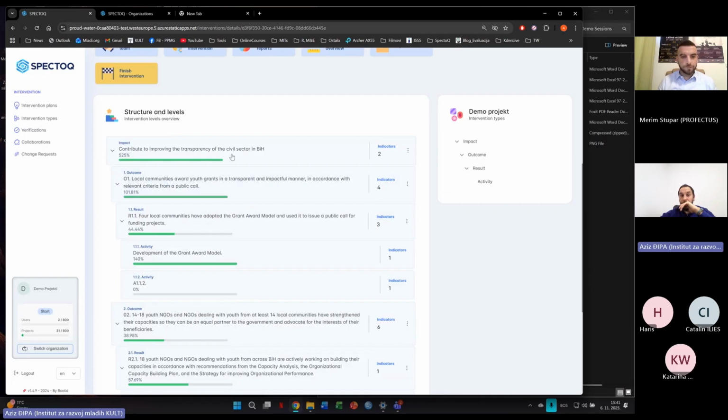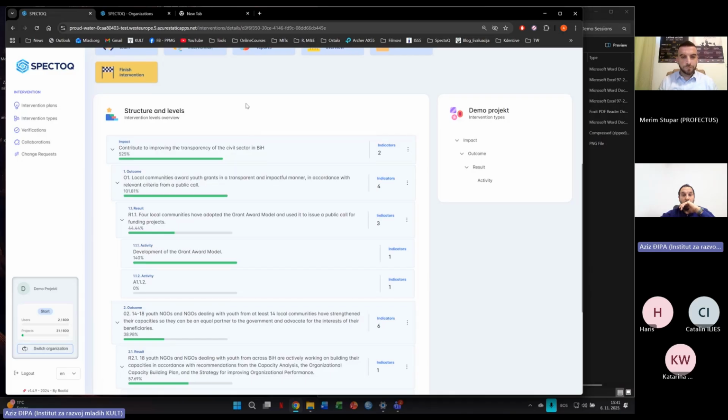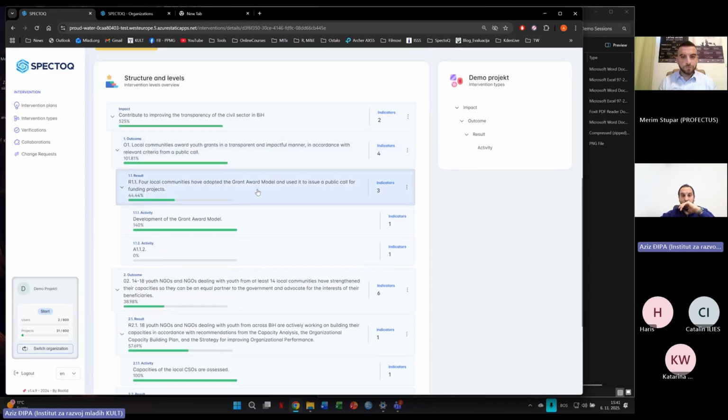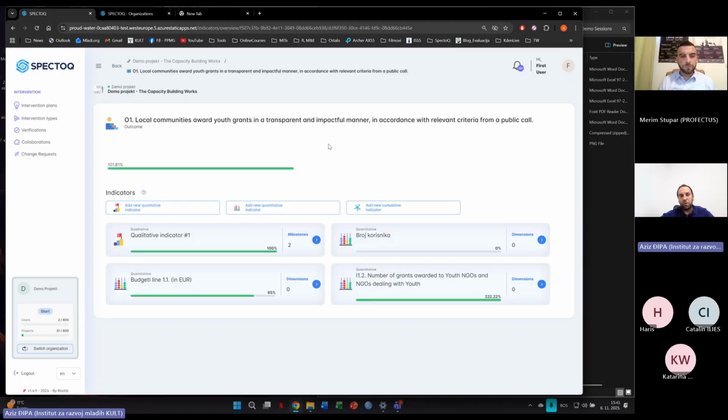So when we do the copy-paste section of the work and import our application to the monitoring software, we want to define the key measures or key performance indicators for every one of these levels of results, which could be provided in the log frame or results framework, but sometimes they are not defined in the framework. If they are defined in the results framework, it's great, and it's much easier to do the monitoring job and import the application in the software.